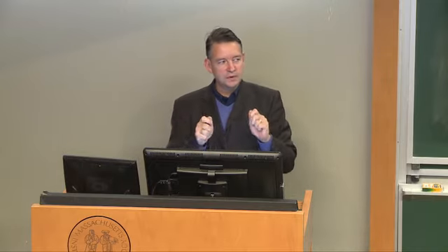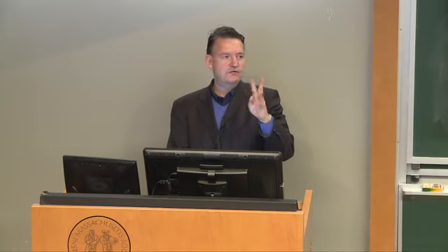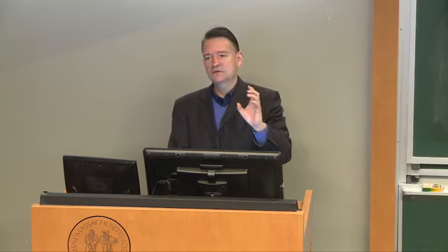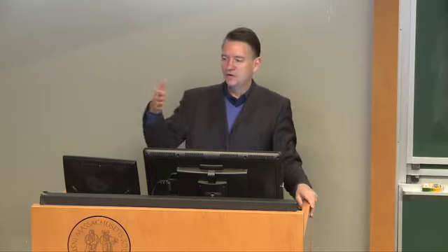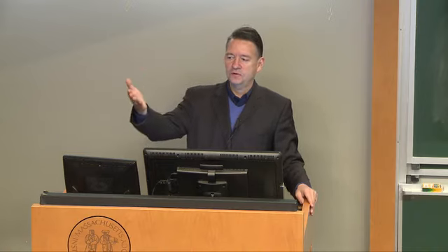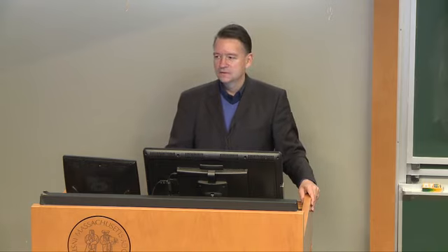And if there are problems, try to isolate these problems and say, okay, by and large the testing went well, but we have 3, 4, 5 issues that need to be addressed, and you can tackle these issues one by one. But if you don't have a really good contract in place, if you don't have a clear requirements baseline, and if you don't have a good relationship with your customer, you're setting yourself up for big, big problems.